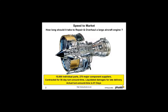It is a complex process to dismantle, repair, rebuild, and test an aircraft engine. It is made up of 10,000 individual parts from hundreds of suppliers from all around the world. The contracted turnaround time is 56 days, but this client was taking 81 days — not a good place to be with liquidated damages for late delivery.